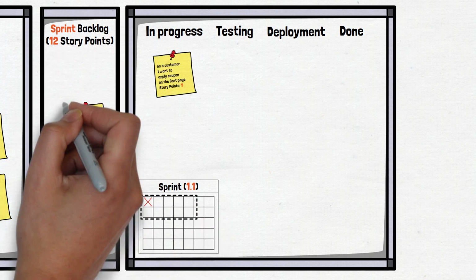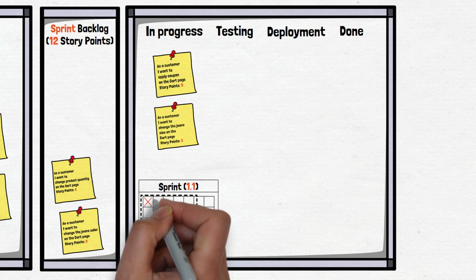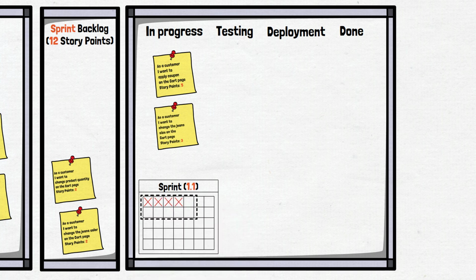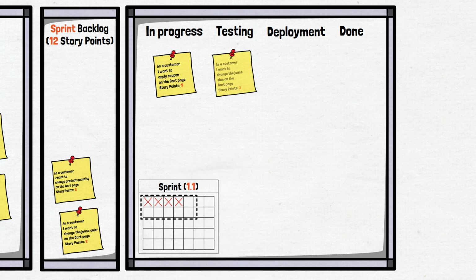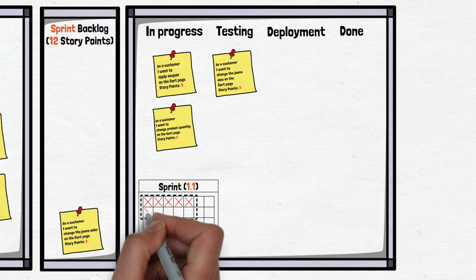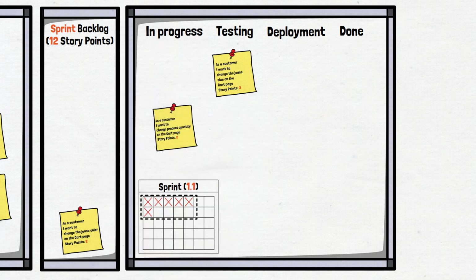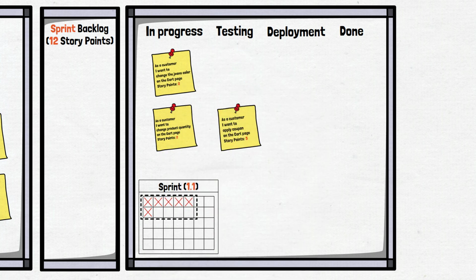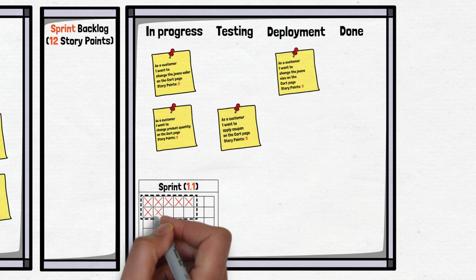The active development phase begins, which will last 2 weeks. The team will have a meeting every day and use a burn-down chart to monitor whether progress is on schedule. Developers will do their magic. After that, the testers will do their magic. We simplify the scheme and show the happy path, when all tickets are developed and tested without problems.